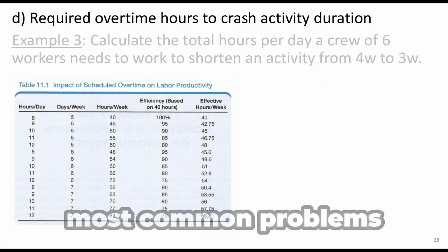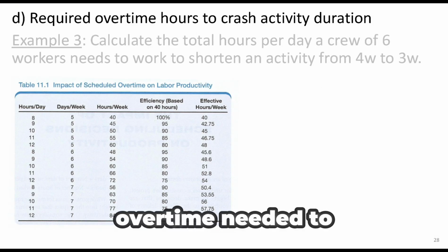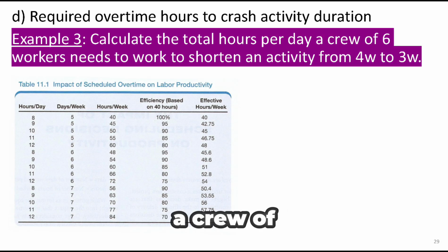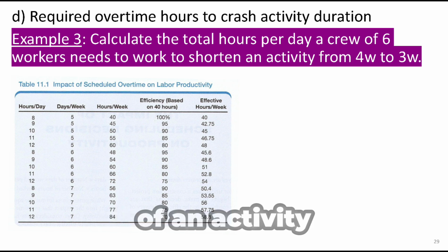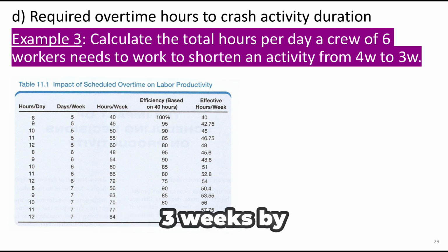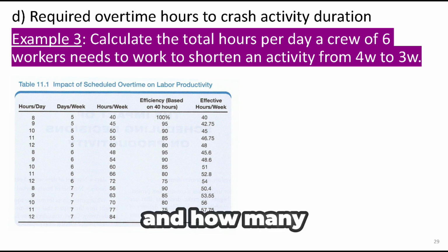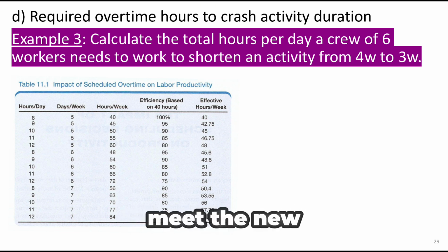Now we come to one of the most common problems in construction management: estimating the amount of overtime needed to crash a particular activity. For instance, let's say you have a crew of 6 workers, and based on the project schedule, you need to shorten the duration of an activity from 4 weeks down to 3 weeks by using overtime. The question is, how many days per week and how many hours per day will the crew need to work during that 3-week period in order to meet the new schedule?